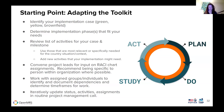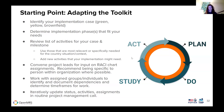We recommend being as specific as possible when assigning roles — not just naming an organization as responsible, but actually saying so-and-so at this organization is doing this specific activity. Then work with the assigned groups to identify and document the dependencies and the timeframes. Iteratively update status, activities, and assignments in routine calls — weekly, monthly, whatever frequency.